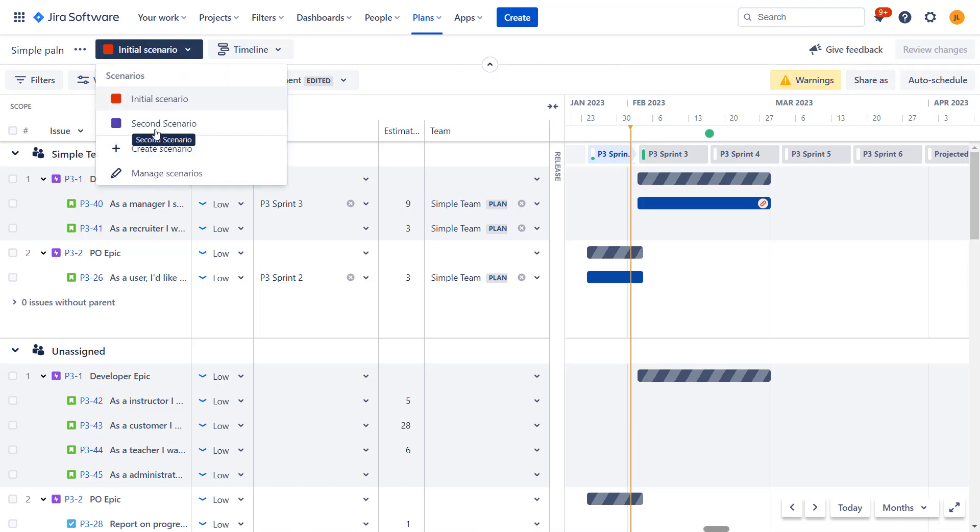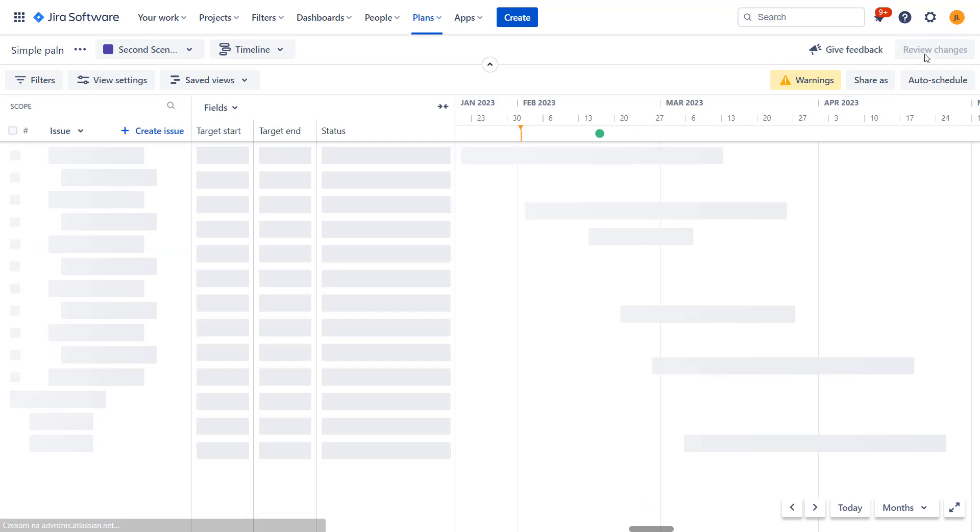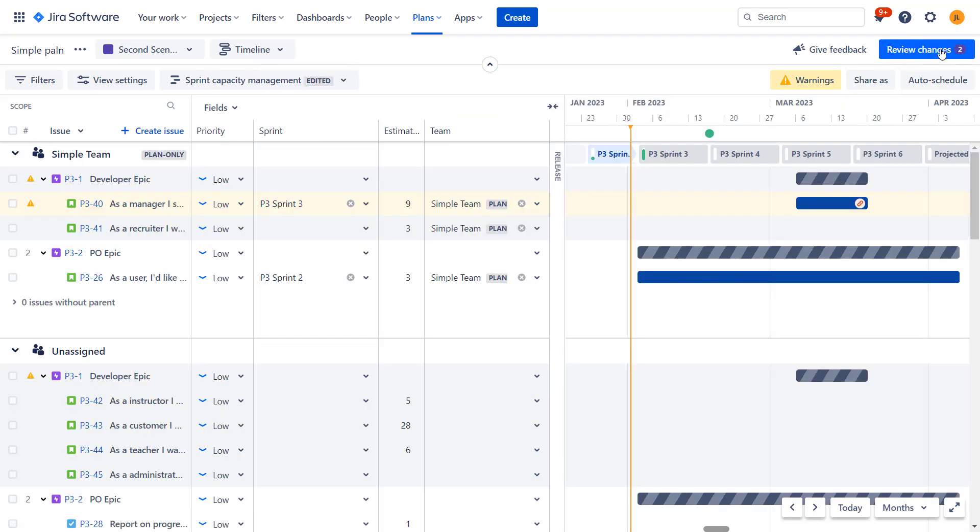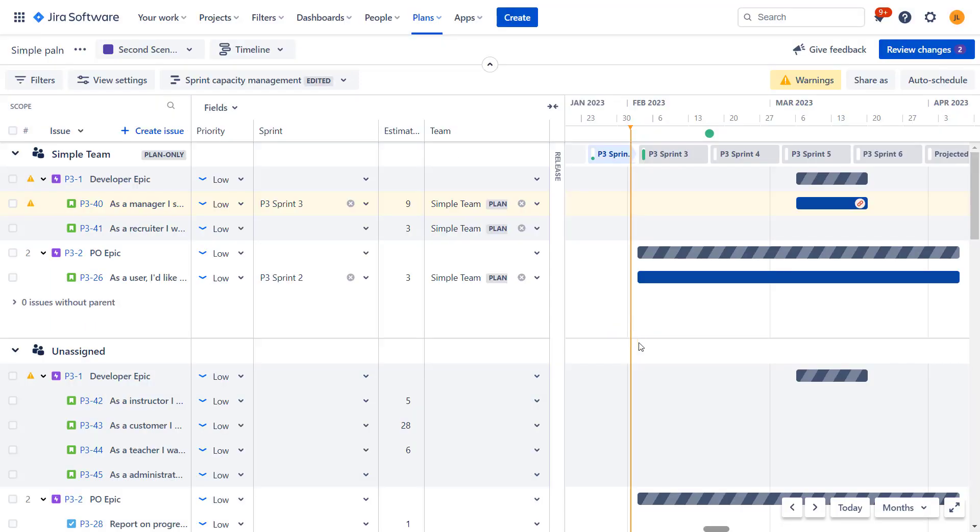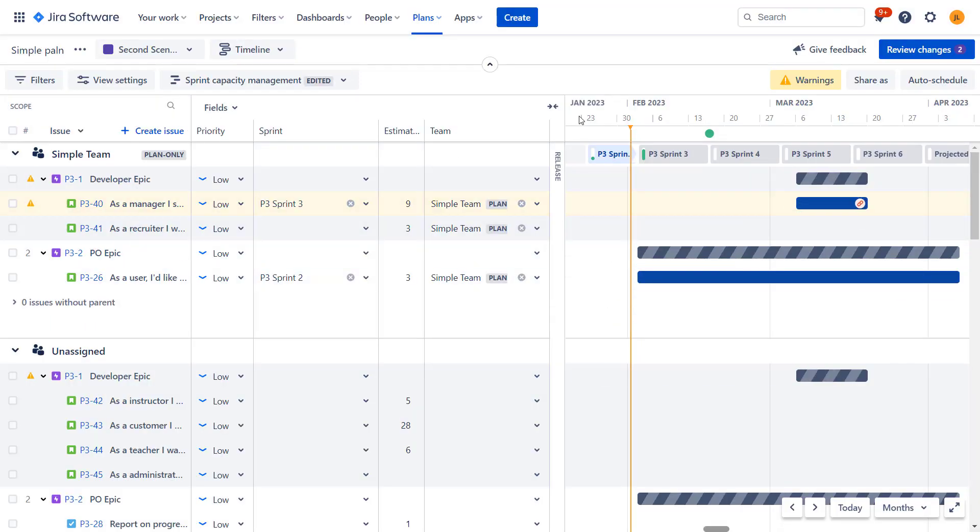So I'll switch the second scenario. You will see that changes over here are still not reviewed. So they are not applied to Jira issues. I could go here and now say selected changes in Jira, but this could overwrite changes that I just did or approved from my initial plan. So there is a risk that working on multiple plans you will get kind of a mess.